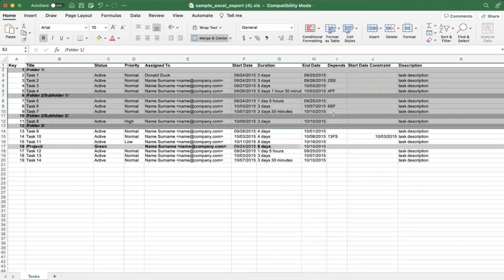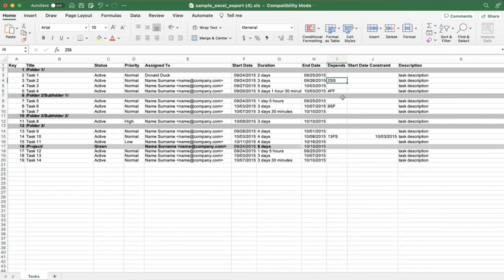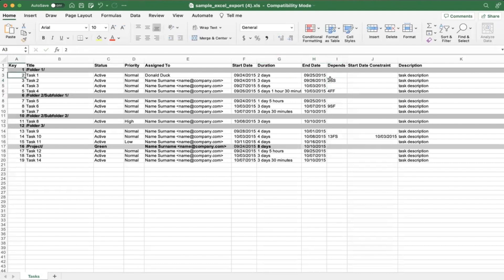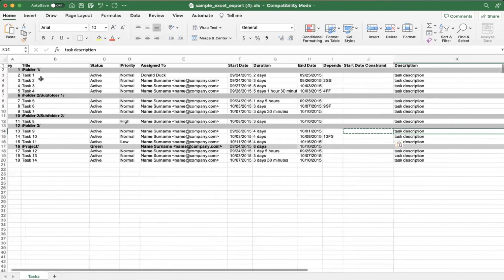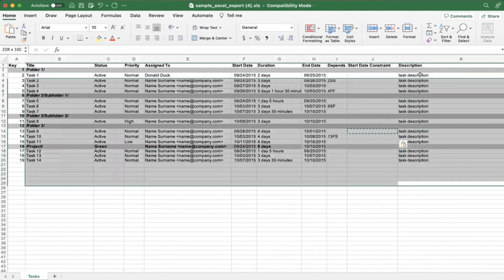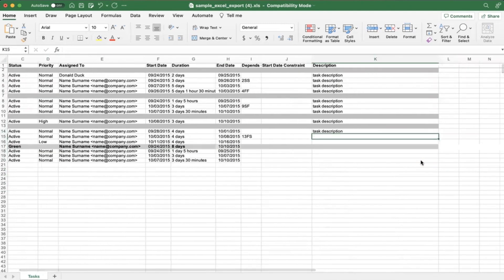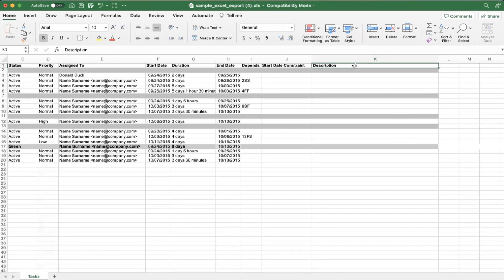For dependencies, I usually set those up inside Wrike after the import rather than during the import itself, as you have to know the exact format. But it's technically saying 'when key two starts, this current row starts.' Start constraints — I'd say let's just avoid that one for now and leave it blank. Description is only needed if you want to map to the description section of a task or project. The column headers need to be present, but the data cells can be left blank if not needed.